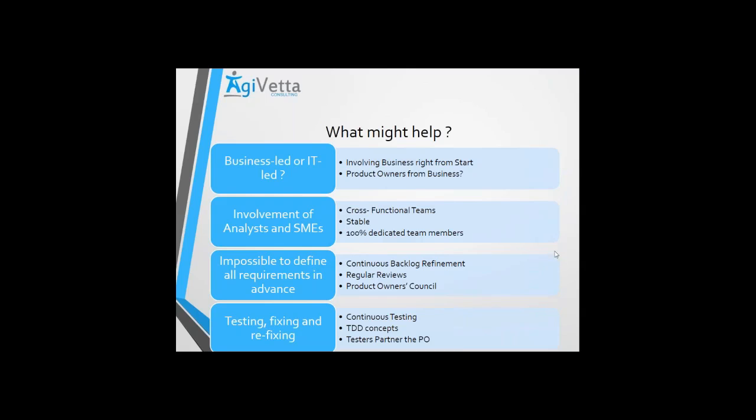Yes, so Deepak's question, that's what I was trying to answer, because as I said again, if you have certain SMEs or certain roles that you think are not required full time for the project, it might be good to go back to the cricketing example and cross-train people with the skills that they might also use. So while the developers might also become SMEs at some point of time, maybe one of the senior guys becomes one, but that involves time investment from the team members, as well as expectation setting with the end users. So shadowing, pair programming, pair reviewing comes into the picture here, so that in the long term you are able to groom team members who would be able to take up these roles. So that will give you a stable team.